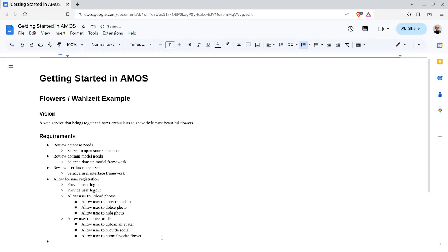And that is what the most basic things that a user might want to do. So the purpose of the website is to, well, one aspect most certainly is to show these photos. So show random photo on homepage. Why am I getting to this only now if it's the primary purpose? It's kind of implied that if you don't have users, and they have not uploaded any photo, you cannot show any photo. So probably you have to first implement user functionality, having a user account, allowing them to upload photos, and then can you move on to show random photo. So in terms of prioritization, you have to do this, allow for user registration, allow user to upload photos, and then you can start on this, jumping over, having a profile. Not so important if this is where you want to get to.